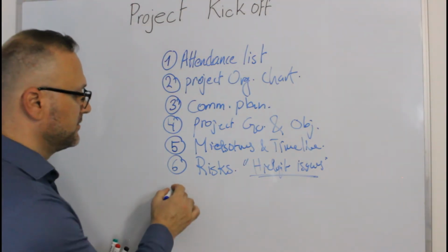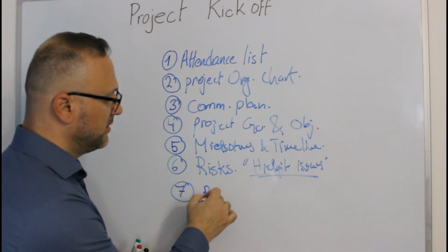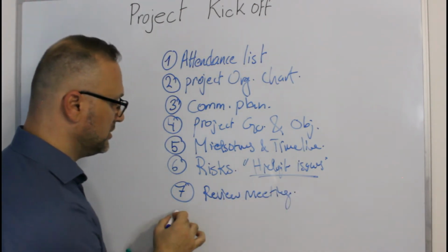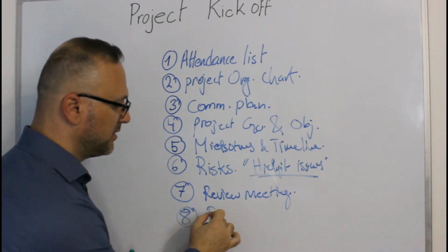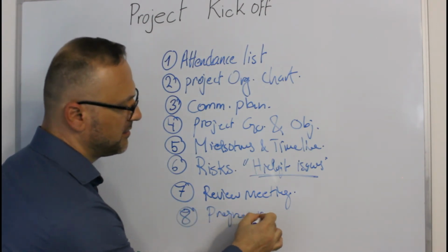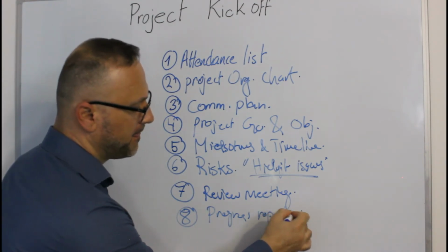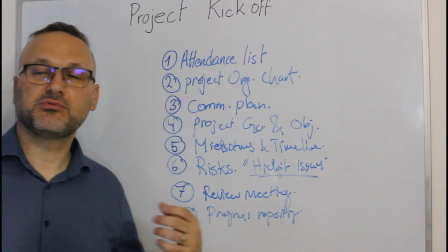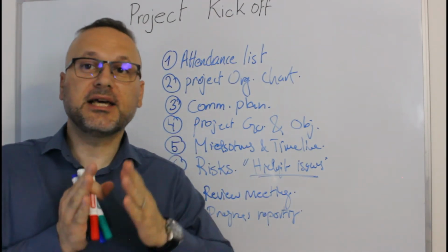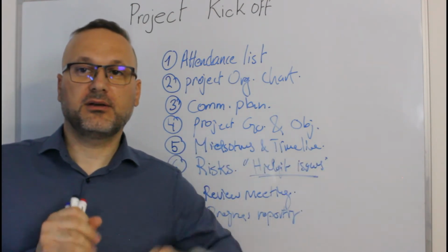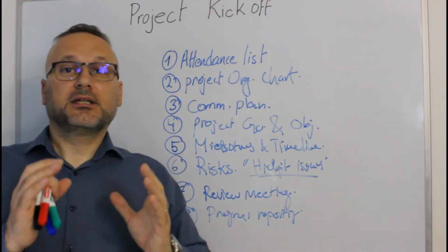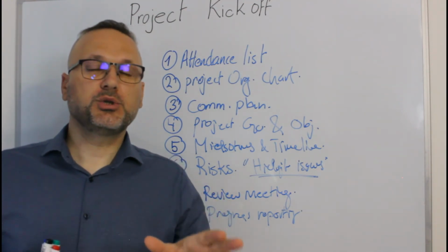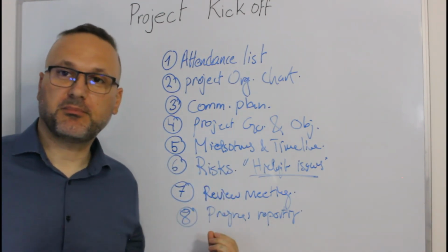Next one is the review meetings. Also, I will include the progress reporting. The progress reporting, as a project manager, you had to deliver to the client at an interval, timely, agreed as per the contract, if it's weekly or if it's monthly at least. You should always prepare the progress reports.